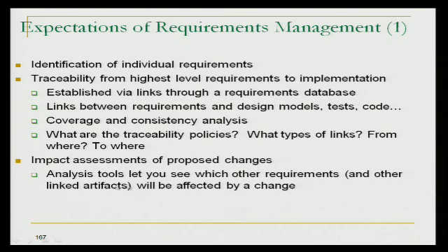And then impact assessment. Someone comes to you and says, hey, I want to make this change. How do you know it doesn't impact a number of other things, right? You take something off the user interface, that could impact all kinds of things all the way through the system, right? So you have to have that impact assessment, which also comes with having good traceability, but it's a form of requirements management. And change control.